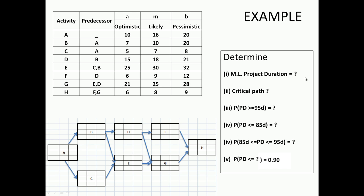One is, we can look for the most likely project duration. We can certainly get what the critical path is. PERT also lets us ask: what is the probability that the project duration is greater than or equal to 95 days? We could not ask such a question in CPM. Or, what is the probability that the project duration is less than or equal to 85 days? Or between 85 and 95 days? Or, given that my probability is 90 percent, what is the duration I should finish my project at 90 percent probability? All of these types of questions can be asked from your basic PERT data.